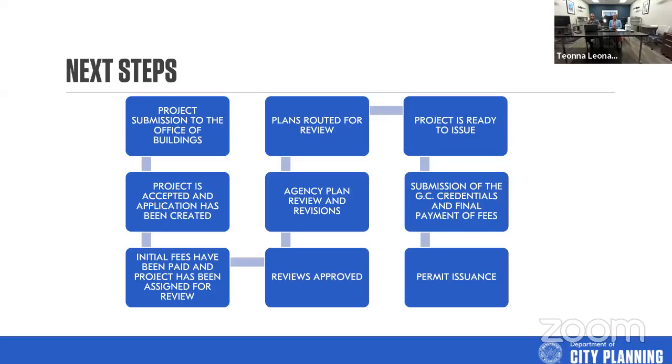Depending on the scope of work on the project, the plans will be routed to, just generally, the buildings reviewers, the arborist reviewers, site development. If it's a new house, it's going to go to sewer capacity and zoning. Those are typically the 5 reviews that you deal with when working on a residential project. And I know we're talking with the MPU, so we're not going to go as deep into the commercial piece, but for residential, it is those 5 agencies.